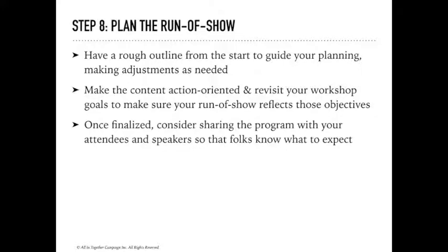And really important that a component of this finalized run of show is having the actual times of all of the different elements of your program outlined. So, for example, from 3 to 3:10, doing this part of the presentation, and then from 3:10 to 3:30, and so on. But having these actual timestamps and timing laid out is going to be really helpful for you day